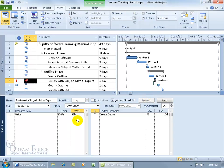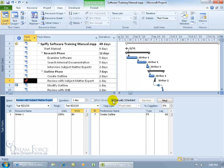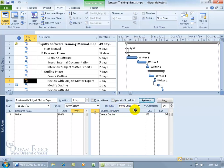Nothing. You'd think that 48 hours would reflect a duration of 6 days, since you can't work 48 hours in one day. Let me hit undo. So the work field is the only field that won't update the other fields in the formula when you're in manually scheduled mode. Now if you switch to auto-scheduled mode — uncheck it and click OK — the task type field comes into play. It is now applied when you update or make changes to any one of the three time fields. In manually scheduled mode, the task type is not in play; uncheck it, and it is.